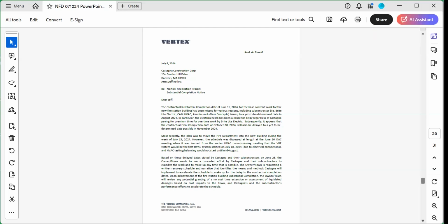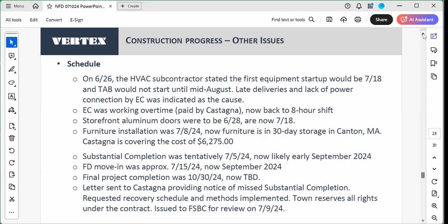So just to touch a little bit on the plantings, a lot of the plantings are on the south side, the east and the west, which they can actually plant. Being a month or two behind, they'll be able to plant the plantings, if you will, and the seed and the grass, because I think October 15th is that date. I think Steve is right. We kind of leave it up to them to tell us, all right, we've missed our window. We're going to come in the spring, in which case they have to stabilize it.